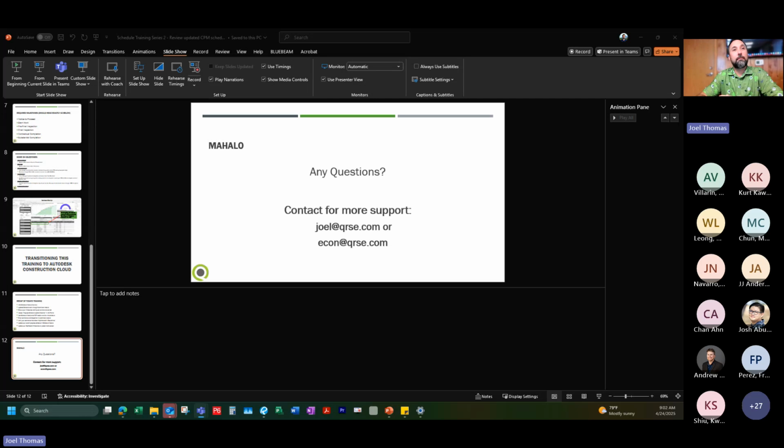If they're switching, you would require them to switch all of their past schedules. Yep, we discussed that. That is exactly what we did on Old Lane when we started our project. It was using Project, and then about 3 months in, they said they were going to switch everything to P6. I said, well, for our data purposes, you're going to have to rebuild it from the start. So they did have to go and do that, but in the end it worked out because P6 is, in my opinion, a little bit easier to use.